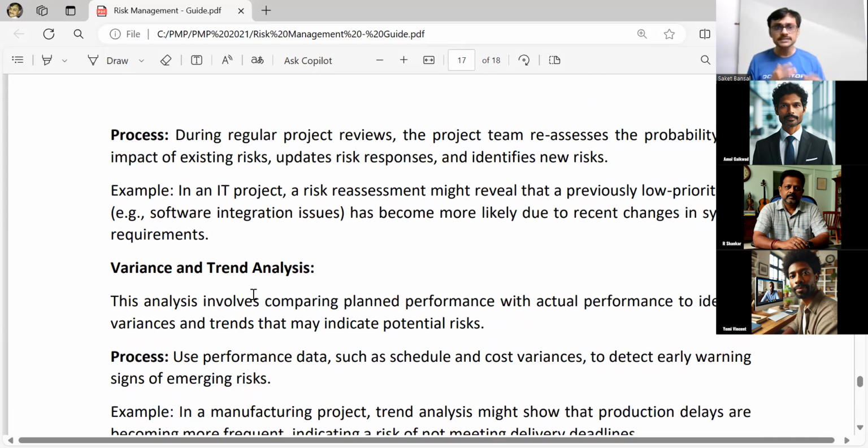I will also check if there is any risk where the probability and impact are expected to change. If changed, I will update it, and I will have an updated risk register. After that, I will identify the 2 top risks which I want to share in my management discussion. And I will also identify if there is any risk which requires escalation.